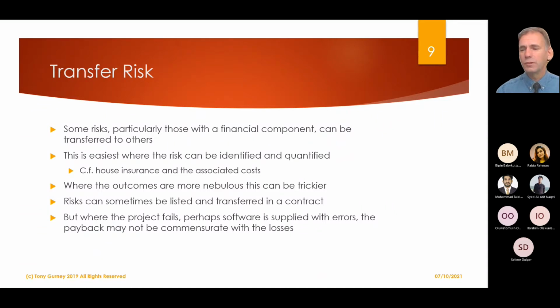And how do you precisely determine the disruption? How do you put a number on, oh yeah, well, we didn't have the server, so 10 people couldn't log in and they couldn't do this. Okay, well, that's one number, so 10 people and you're paying them £100 a day, that's £1,000 a day that you're losing.